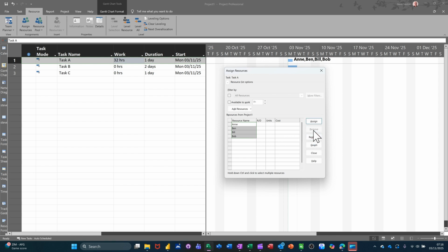If I remove them again and just try and show you that, if I highlight 2 people, that's my initial plan. I think 2 people can get that done in 1 day. But then I decided they need a bit of help. So now if I assign an extra person, it starts driving the duration down. And again, it will drive it down. So it's only additional resources when that effort driven tick is on that affects the actual timeline and brings the duration down.